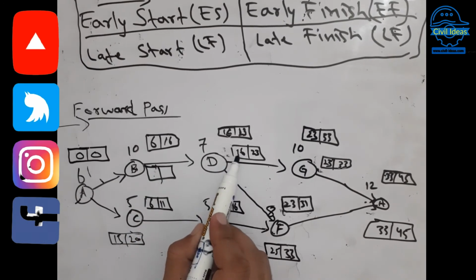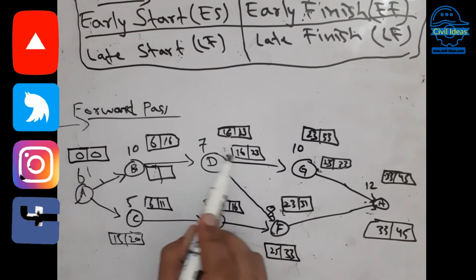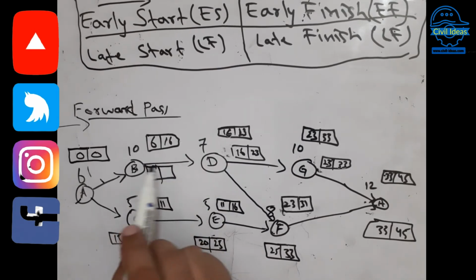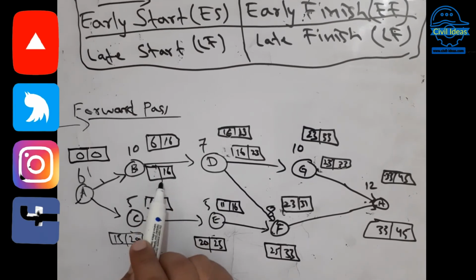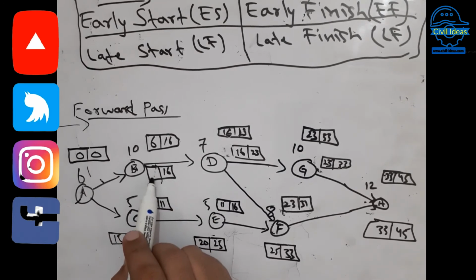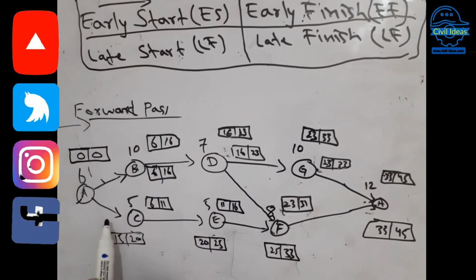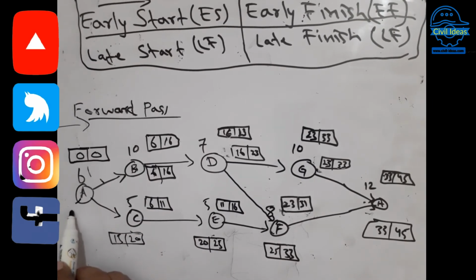And 16, there's one successor for the activity B, so you have to take the late start time of C, and 16 minus 10, you have to take the 6. Okay, and now we have to move to the first.